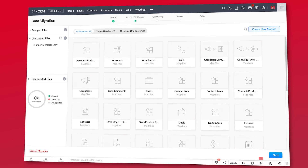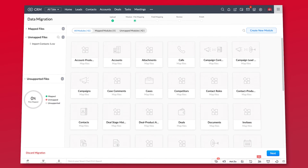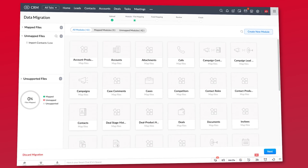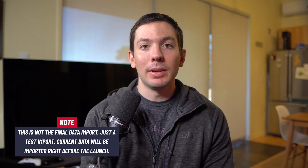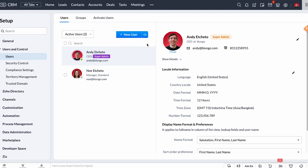It is important to know that you will also be testing how to import data to your new app — sometimes this process is a little tricky. This is not your final data import; you will do it this time to test that everything works, then delete the import and get up-to-date data that you will use on the launch date. Another important part of testing is to give a few users access to the new app so they can check it out by creating records, navigating, performing searches, changing settings, and more.